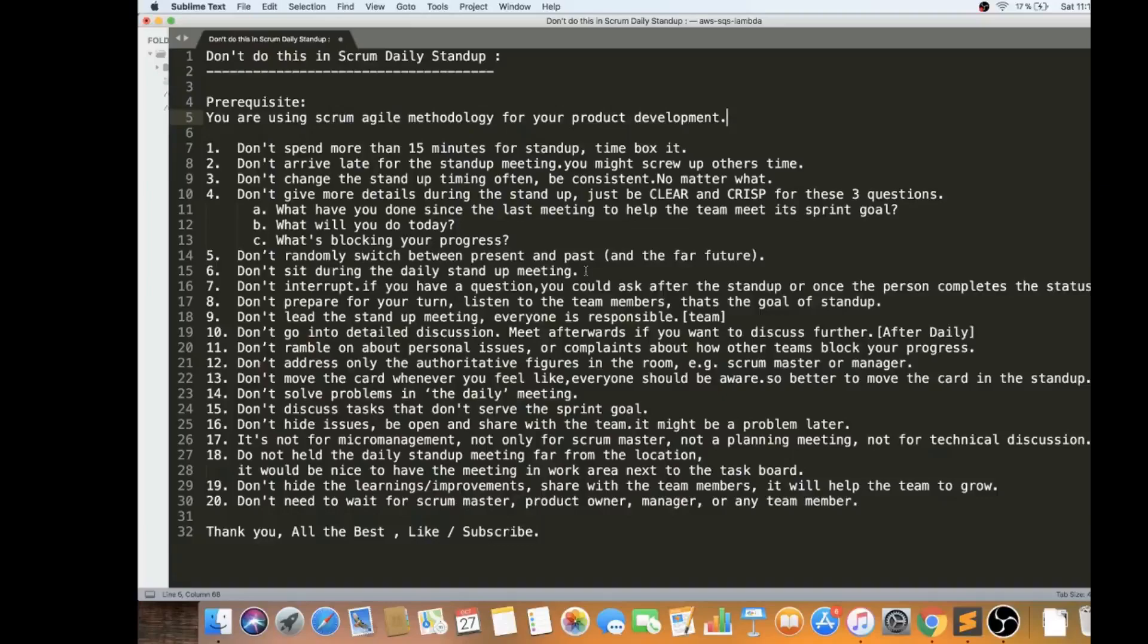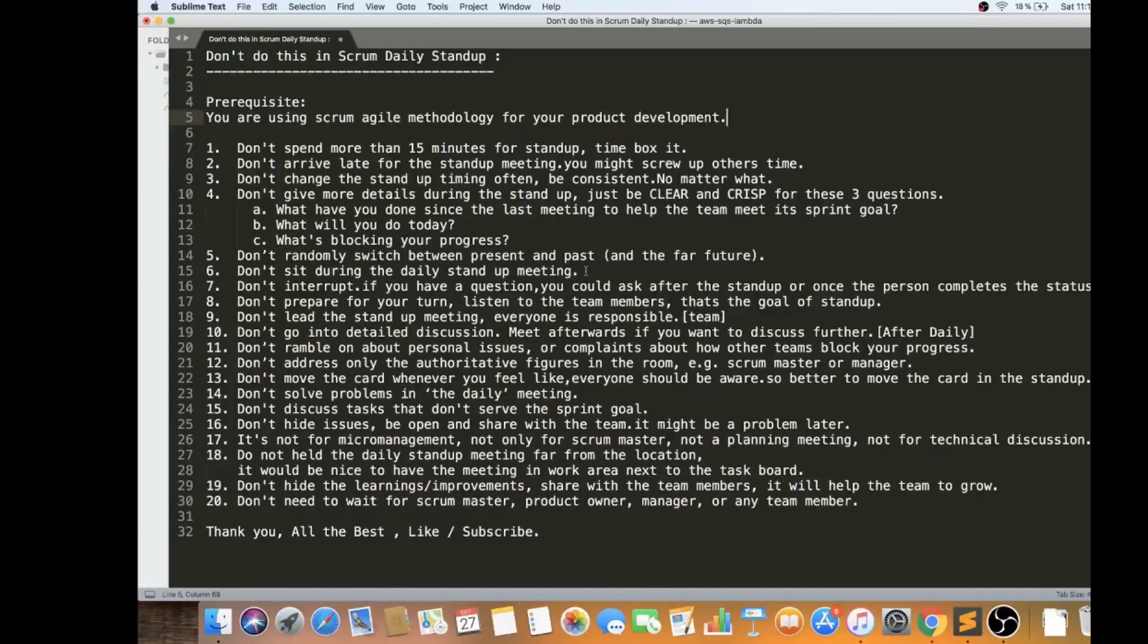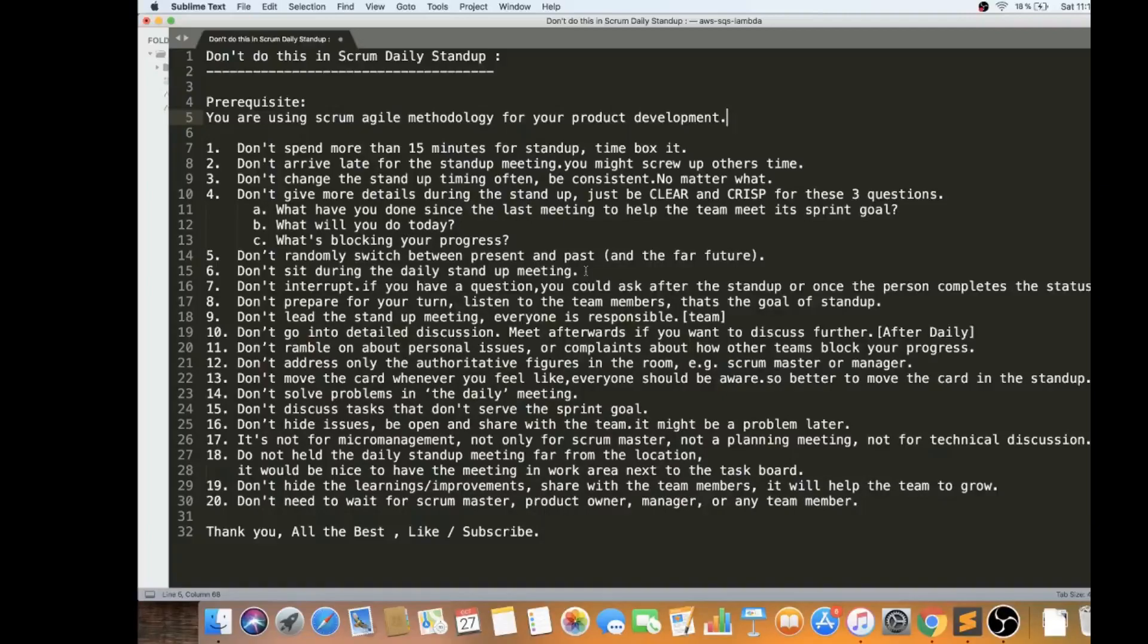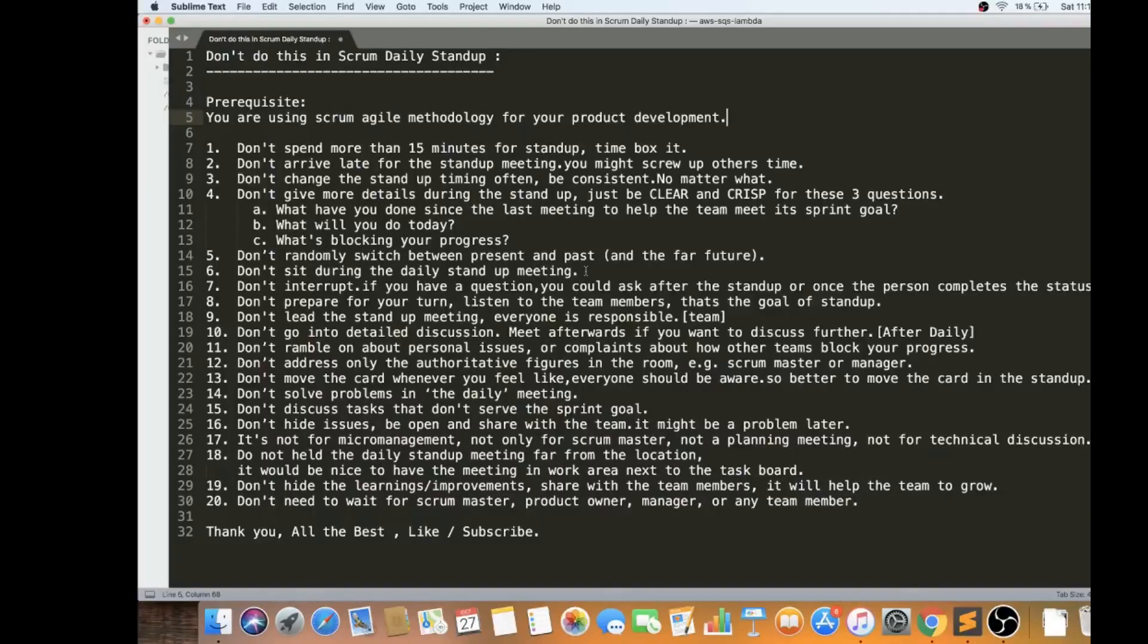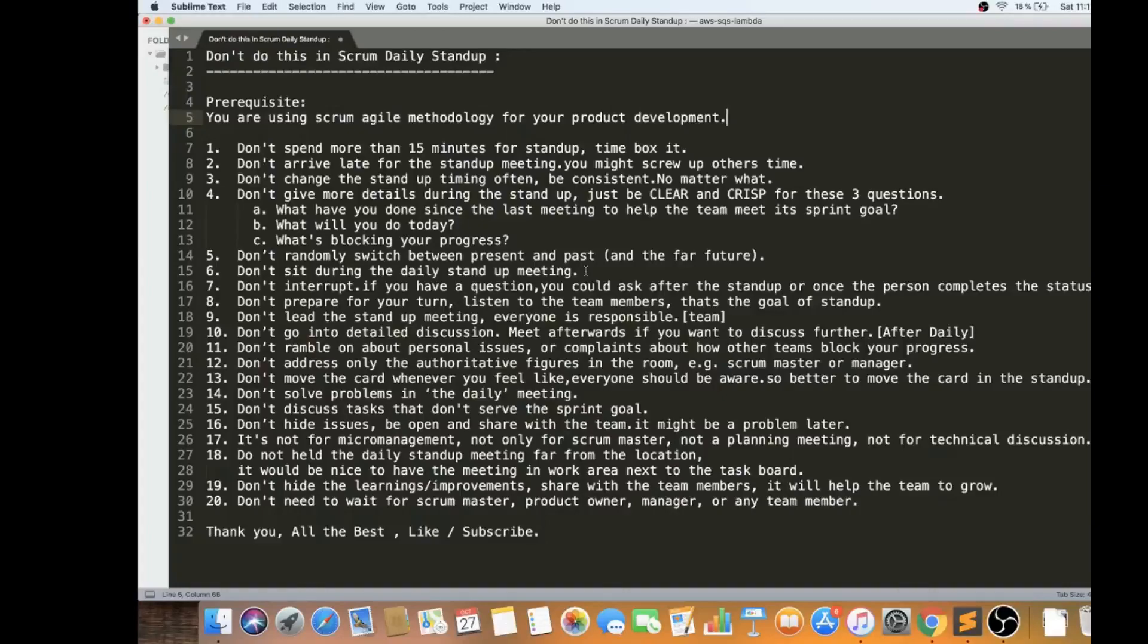Always listen to the other team member status as well. The ninth point is don't try to lead the standup meeting. Everyone is responsible. Every team member is responsible. Not one person. The scrum master is there to facilitate the standup meeting and he is not going to host. It's the entire team that takes the responsibility. Even if you're a senior person, don't try to lead the standup meeting. Everyone has to open up and stand and state the update.